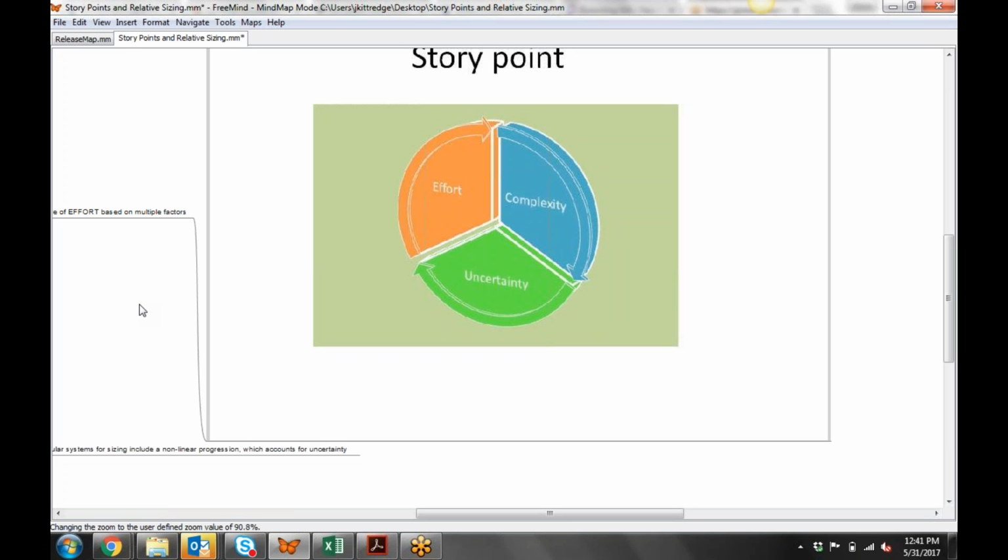What's important from the measuring point of view, because each team has their own standard, is that the team is internally consistent with what factors they consider when they're making story point estimates. Because overall, when you're dealing with this from a planning perspective, your velocity is going to be determined by whatever the story points were determined by the team. So the team can have their own standard as to what a story point is. The whole system is designed for that because everything's based off of the team and the team's data. So that's an important thing to note.